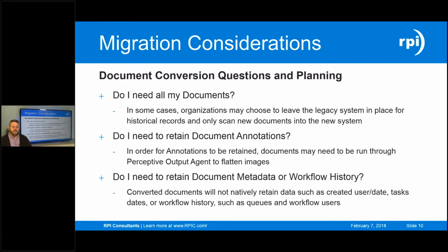So a few questions to ask yourself for your document conversion. Number 1 is obviously, do I need all my documents? In many cases, organizations may choose to leave the legacy system in place. So if you want to go down that road, you can leave the Perceptive environment, leave the documents in that environment, and only do new documents into the target system from that day forward. However, going with the assumption that you will want to migrate some or all of your documents to the new system, the next question is generally going to be, do I need to retain my document annotations?